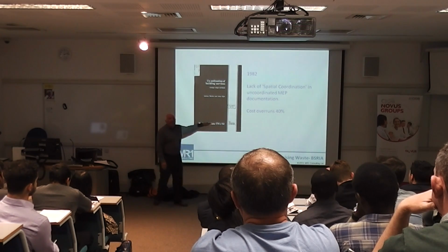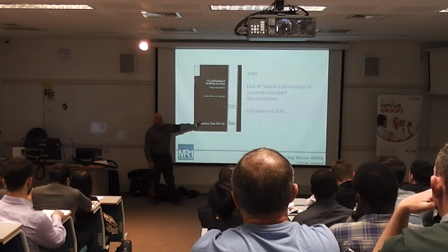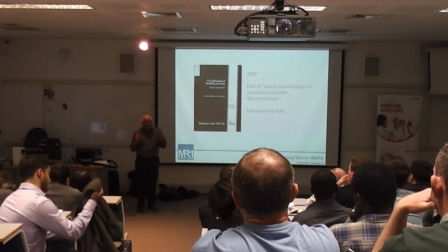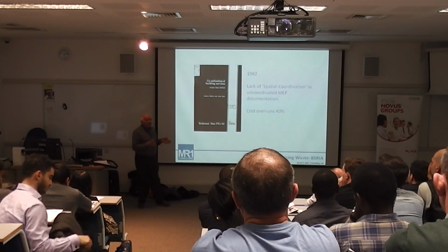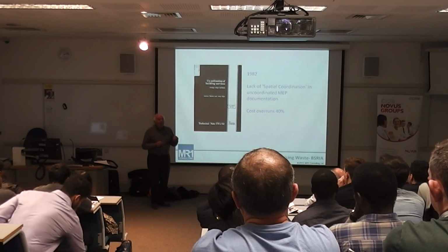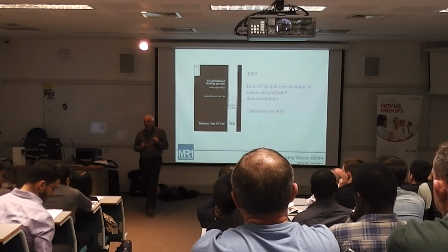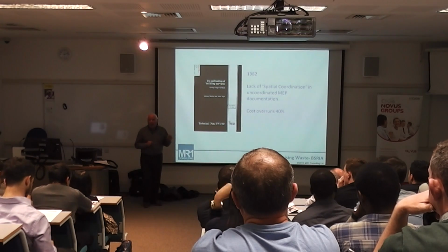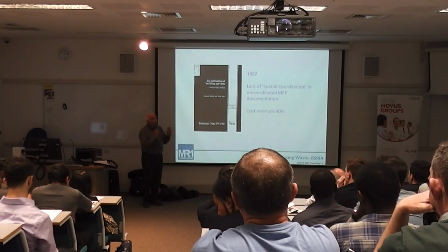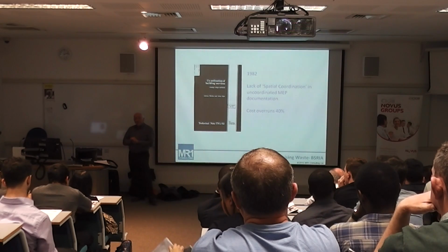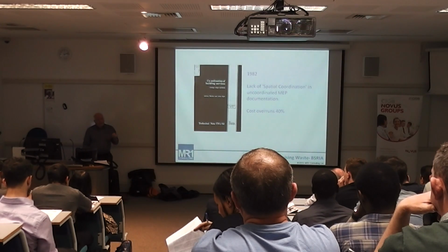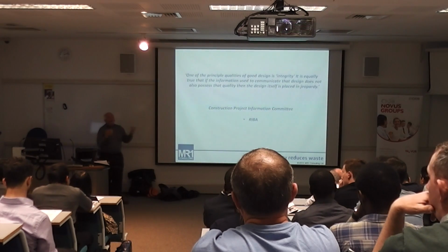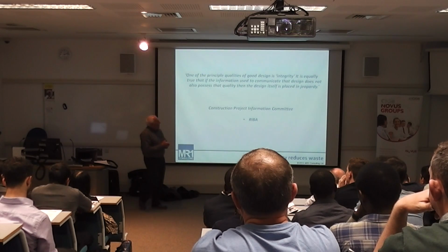40%. Now these figures are not idle, they have been measured, we know how they come about. And I can give you an example in a structural steelwork frame at Basingstoke Town Centre. It was a £1 million structural steelwork frame. It was not coordinated properly, it was not kept up to date, it was delivered to site, and the rework was £600,000. A 60% increase due to lack of spatial coordination and checking between the different disciplines' information. And we just carried on doing this. It's in the culture, this is the way we work, this is what we're going to do.